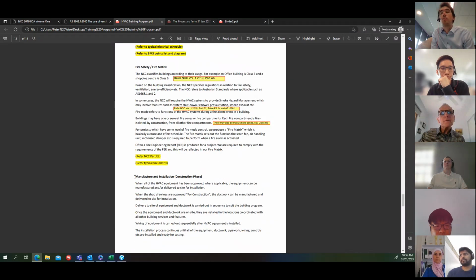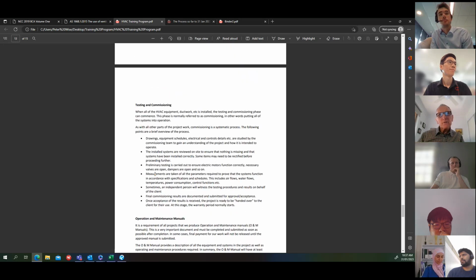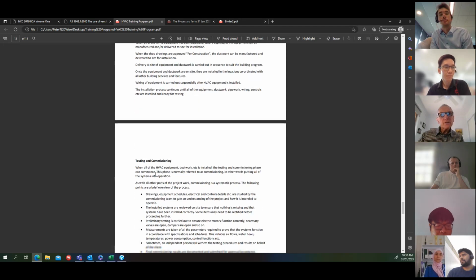So next week we're up to manufacture and installation. For the contracting side, this is where we go on site and we start to install all the equipment. So we're just going to talk about that. And then after that, we go into commissioning. Once it's all installed, we can start testing and commissioning and so on.